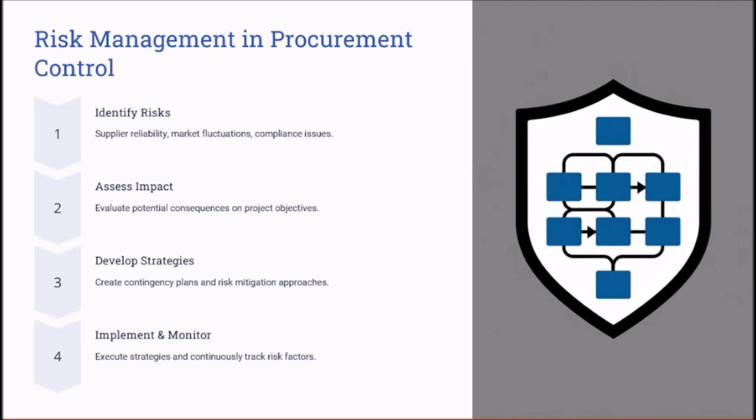If there are alternative suppliers you can deal with who deliver the same goods or services, put them in place as a contingency plan to reduce the impact in case your original supplier or vendor has no control over certain challenges. So now you have backup suppliers for these critical services or goods.